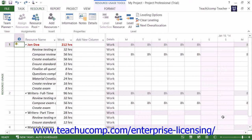In addition to manually correcting over-allocated resources, you can automatically level over-allocated resources in Microsoft Project. When you automatically level resource over-allocations, Microsoft Project will either delay the start times of tasks, delay the work resource assignments for a task, or split task durations in order to resolve the conflicts. It will not change task assignments or unit values of the assignments. If you wish to resolve resource over-allocation by assigning additional work resources, you must do that manually.